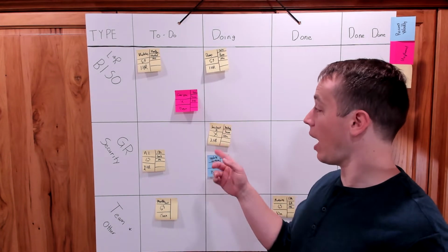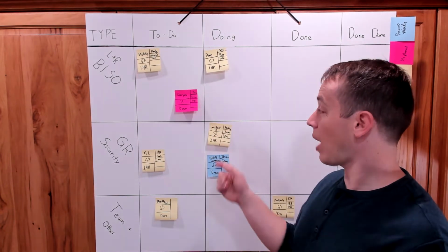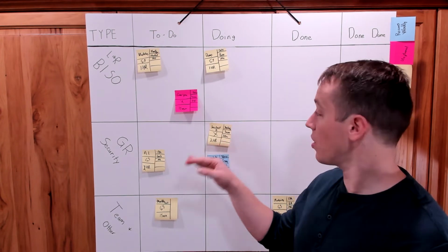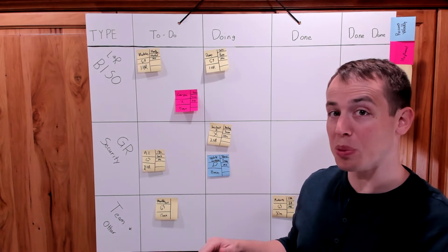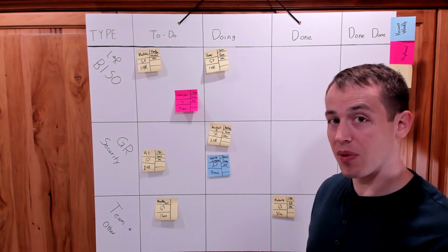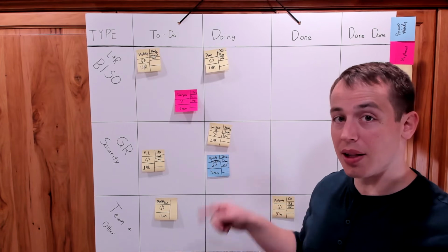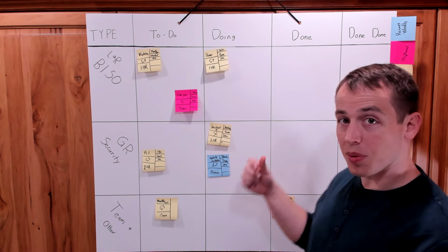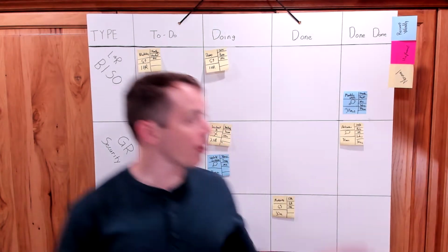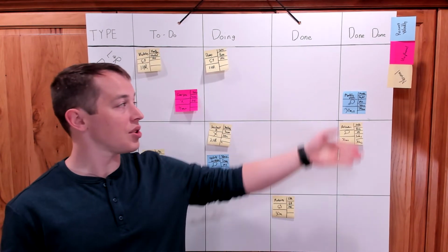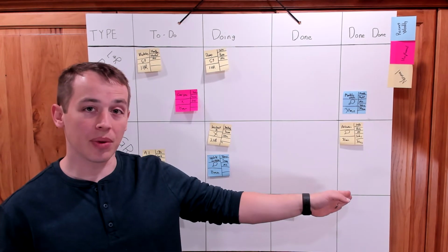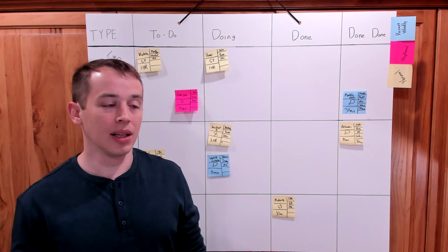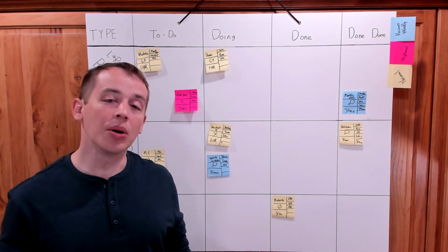The other thing that we might have is, as we're going through some of these things, perhaps an incident we're looking at is taking much longer than we expected. So maybe we've blown past those 2 hours that I have estimated for this incident. What I like to do is actually mark that I've gone past that, because eventually at the end, when they get all the way over to this side, you're going to run into the issue of, did you estimate your time correctly for some of these things? And oftentimes we underestimate how long something will take. So let's continue to walk through this day.